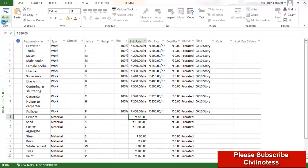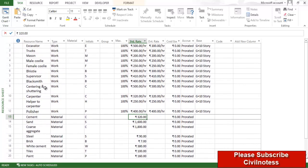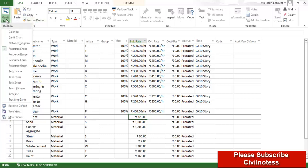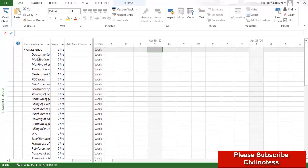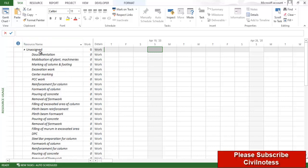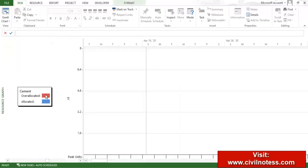This is the overall costing we consider. Now save this. In this way, you need to put the material cost, labour cost, and machinery cost. After that, go to resource usage — you can see all the resources we defined here, but their usage is 0 because we have not yet assigned them to tasks. Nothing is over-allocated or allocated yet.